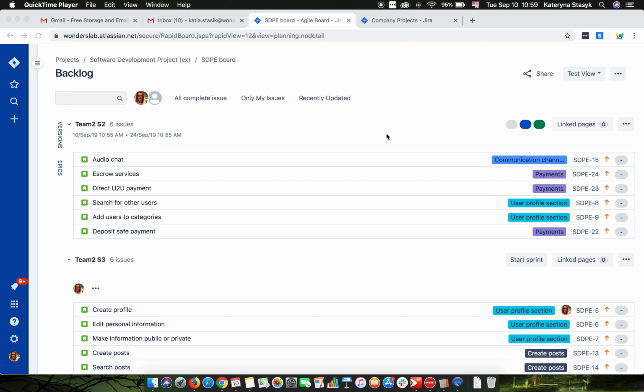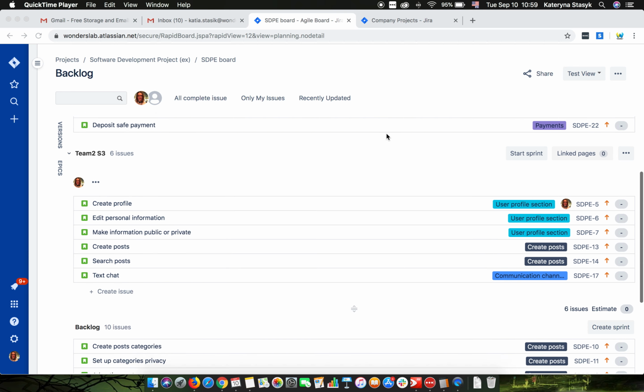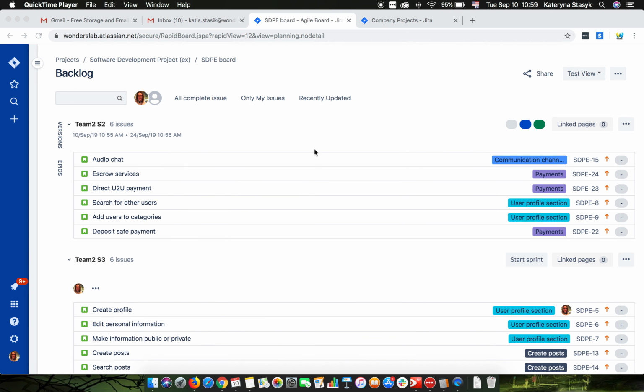But all those teams will be working on the same product. They have to be synchronized, they have to stay intact, and work on the same backlog. So sometimes we have issues with how to split this work and how to make sure everything remains structured and simple, and for that purpose we want the rituals like daily stand-ups, plannings, and everything else to also be separate so that each team can focus on their specific piece of work, delivering value to the user.